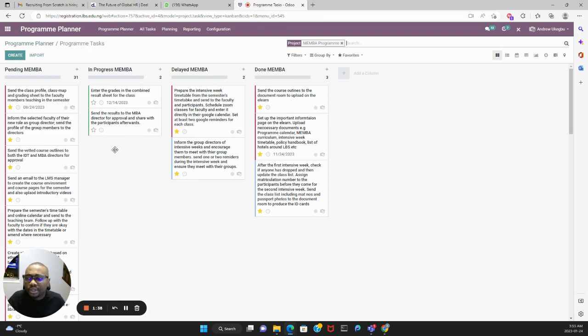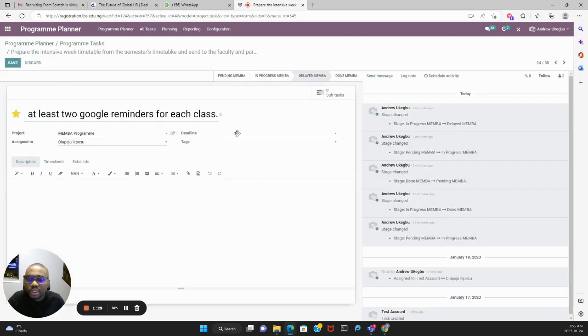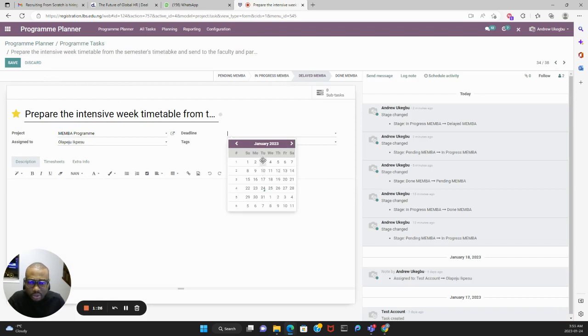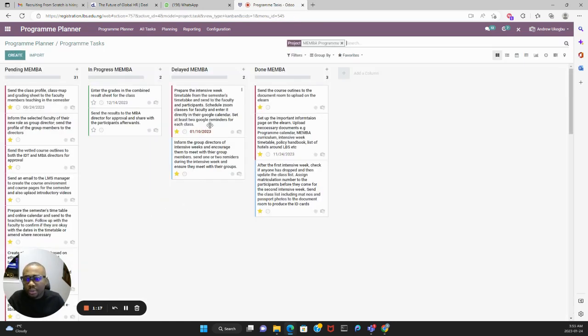Then let's take another scenario. Let's assume I have this activity here, and I'm supposed to be done with this activity in, let's assume, the second week in January. So this is the second week in January, the 10th. I'm supposed to be done with this activity, and I'm not done with it yet. If you come here, you can see this activity is in red. So what that means is that once you look at your dashboard here, anytime you see a red activity that is not done yet, it means that you're being delayed for this particular activity, and you need to focus on it and ensure that this activity is completed as soon as possible.